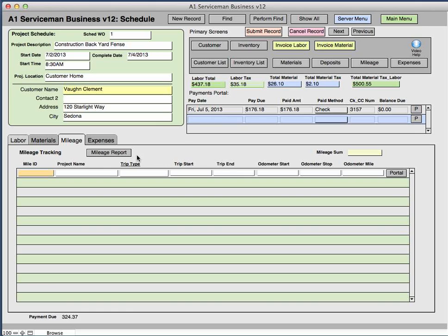And if you say maybe you're going to do 6 trips and it turns out that it was 10 because the client didn't get his act together, then you're going to want to up your rate a little bit with a change order for the additional mileage that you had to pay out. Because it's not only the physical miles that you're going to get back from the government, there's actually wear and tear on your vehicle that's included in this. And that's not tax deductible, but it's a charge that you actually have to do for additional trips, which takes actual labor time, if you look at it like that.